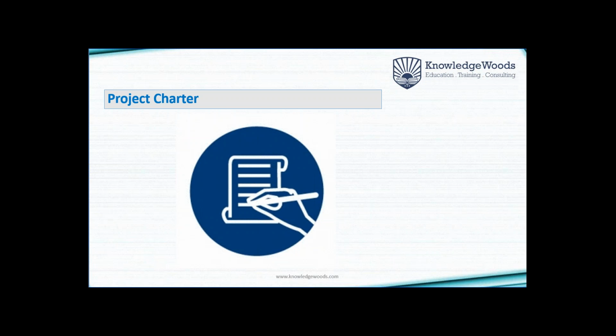Another change which has been made because of the ECO is the topic of the project charter. It has been observed that the project manager is not solely responsible for creation of the project charter. The common consensus is that it is the sponsor or the customer who is responsible for creating and approving the project charter, and the PM is more of a contributor in its creation and in communicating its content to other stakeholders. So the role of a project manager is more of a contributor. He should be involved early in the project so that he can contribute to the creation of the project charter, but that is not his sole responsibility.